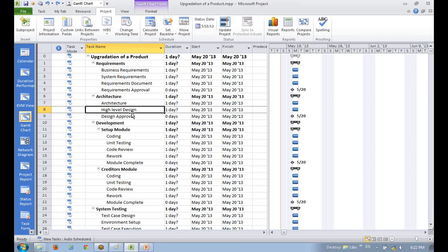Fine. So I am part of the offshore vendor team, leading from here. But when I am communicating to the client, it should be in duration mode. When I am managing the work with my project manager at offshore, that should be in effort mode. Absolutely, you got it. Okay, thank you. You know when to change the role, when the gloves have to be changed.